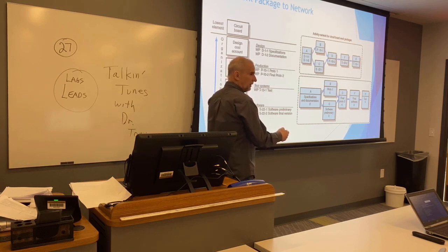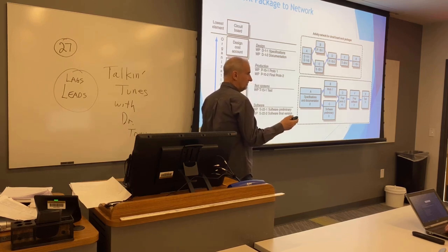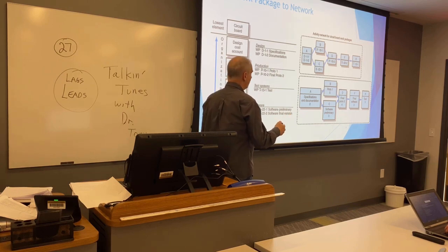So which one is the critical path? This one. It's the longest one. You understand? That's it. That's all it is. Here's what's cool. If this one takes you 2 days, what's this path going to be then? 6. It's going to be the same.